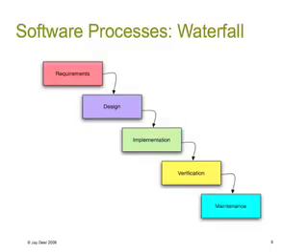So here's a software process known as the waterfall mechanism, one of the standard sequential approaches. It's sequential, you do one thing after another, you do it in sequence, you do requirements gathering, then you do design, then you do implementation, and so on. Waterfall model, you can see it looks a bit like water flowing down a waterfall. Has some advantages, it's structured, it's well understood, there's processes designed around these, lots of software development tools that fit this sort of model. Has some disadvantages, it expects that you know all the requirements up front. It's about having a structure, having a plan.